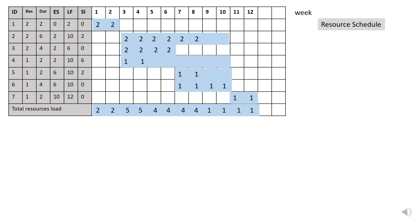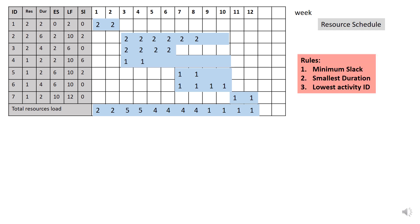Now let's proceed with the resource leveling. But there are 3 rules that you need to consider. Rule number 1 is to select the minimum slack. Rule number 2 is to select the smallest duration. Rule number 3 is to select the lowest activity ID.